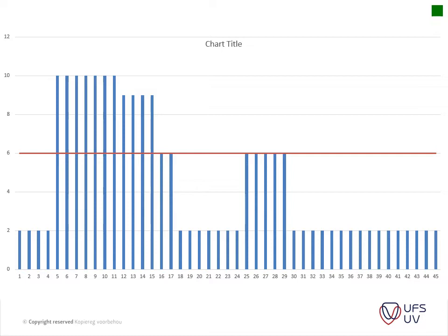Okay, now the example continues to indicate the maximum amount. Okay, so the problem with the contractor is that he only has 6 joiners available to work on this project. If the project completion date is not to be extended, the only solution to the problem is to level the labor demand within the program according to the number of joiners available. This means adjusting the work activities within the available float, but obviously not the critical ones. To reduce the peak labor demand situation, this is shown in figure 18.3.